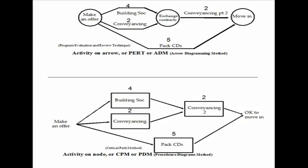With CPM, the arrows don't take any time. They just say what depends on what — what has to precede what. And with CPM, you draw the activities as rectangles.